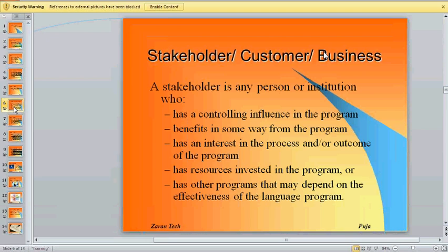So, like I said, with medium-sized projects, it could be high cost, the budget is high, but you don't have too many stakeholders. You only have 2 to 3. In which case, you may or may not have a project manager. So I'd say about 40 to 50% of the medium-sized projects, you are the project manager as well. And large projects, definitely there will always be a project manager. Does that answer your question, Srinivas? Yes, very much, Praja. Thank you.